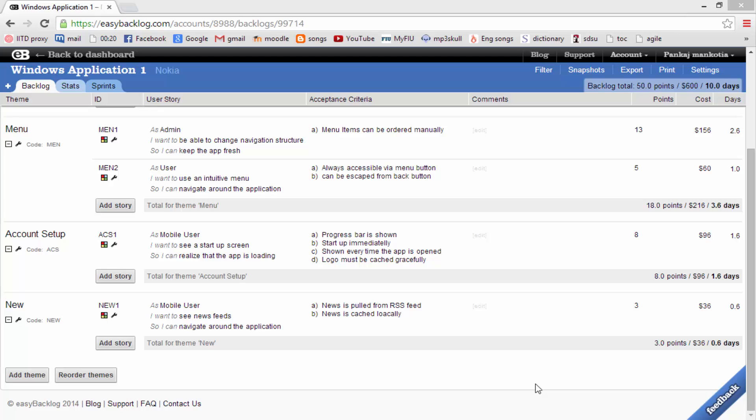Easy Backlog has been helping agencies implement agile while recognizing clients' need for accountability and fixed pricing. Normally, we meet with the client and build our backlog. Easy Backlog is as fast as a desktop application. At any point, we can create a snapshot of the entire backlog. In the form of a snapshot, we may deliver an initial estimation to the client.